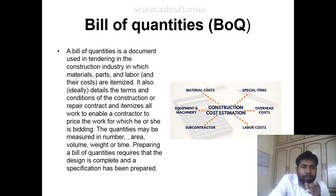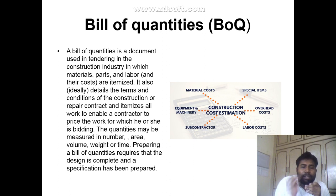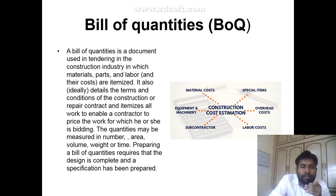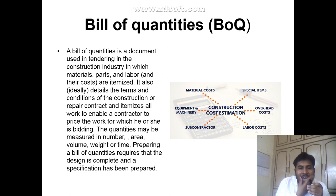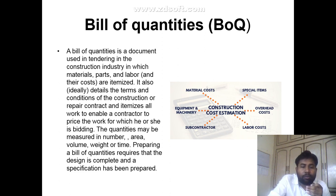Next is Bill of Quantity — BoQ. A BoQ is a document used in tendering in the construction industry, in which material, parts, labor and associated costs are advised. It also details the terms and conditions of the construction contract and itemizes all work to enable a contractor to price the work for which he is bidding.